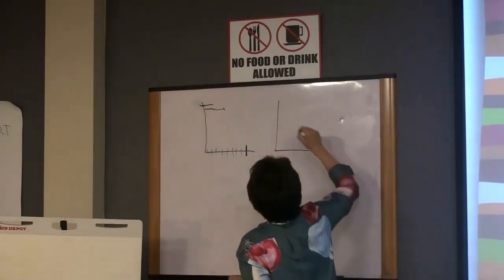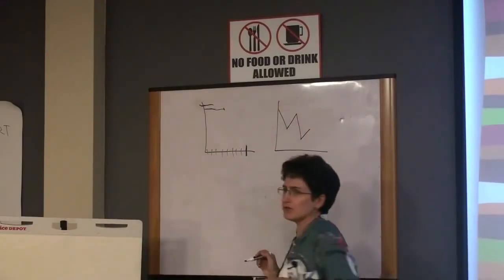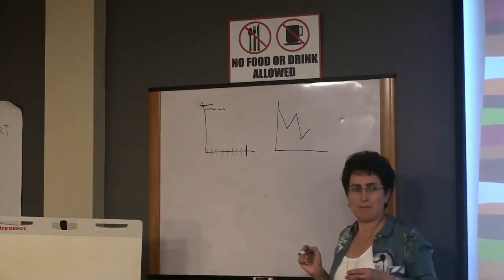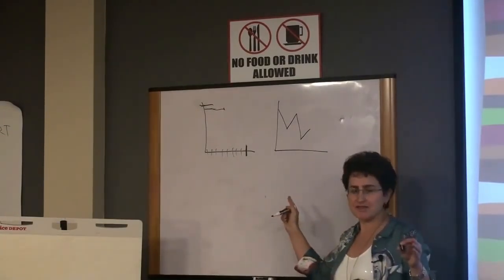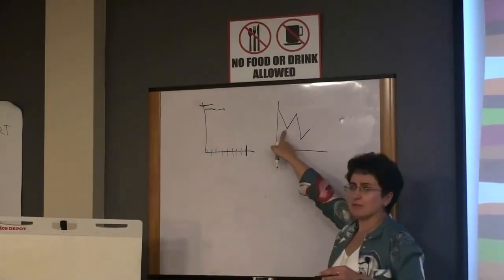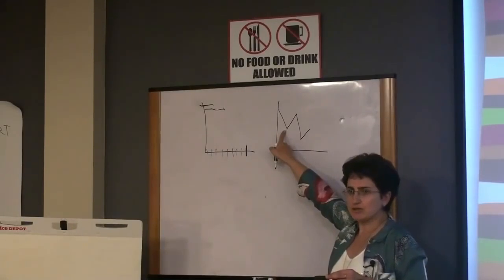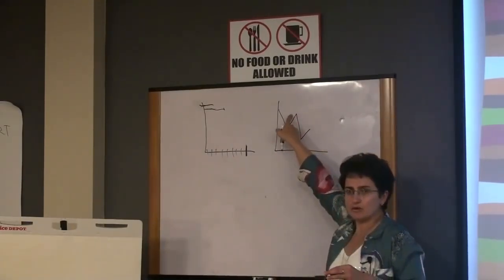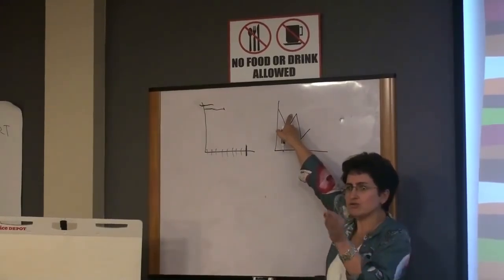So what if you see this burn down chart? What can you tell? They had to redo something. This chart does make sense. It means that the work was done and tested, and then we realized we did not develop what needed to be developed. So we had to redo stuff. At some point, this item went back to the work to be done bucket. From the done bucket, it moved to the to-do bucket.